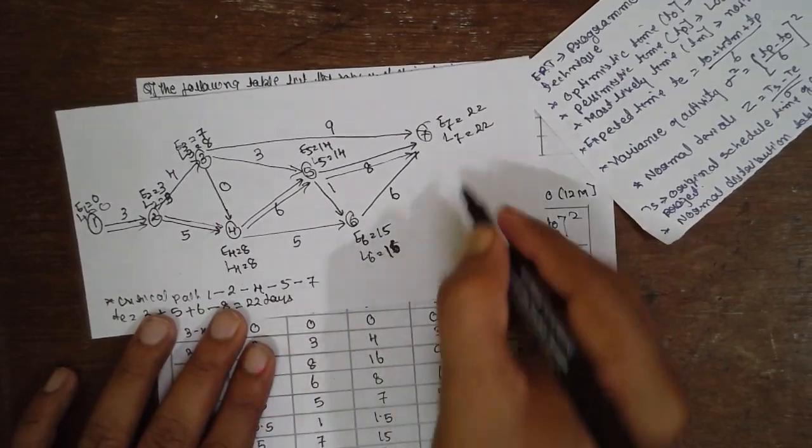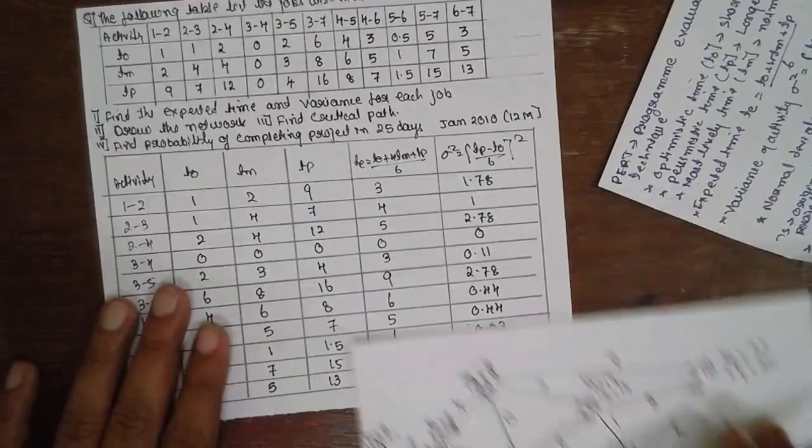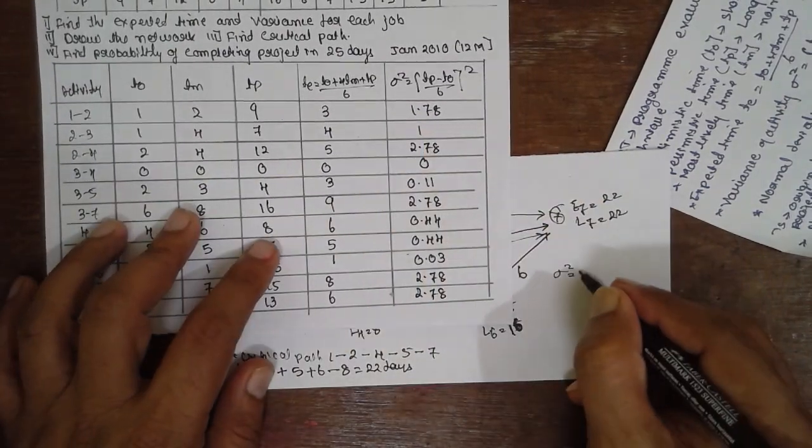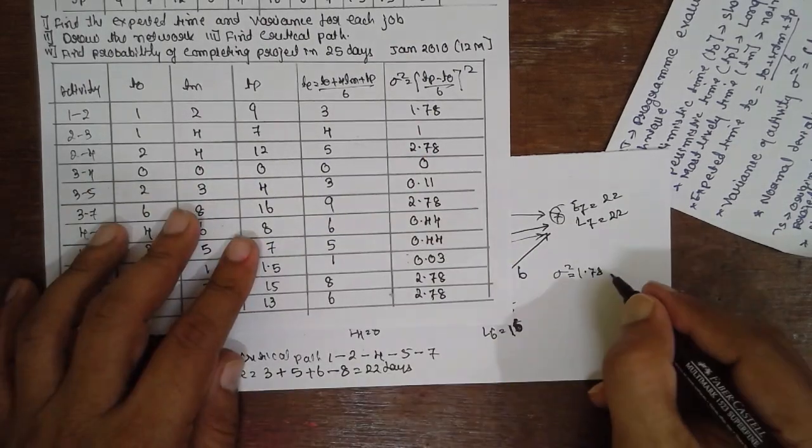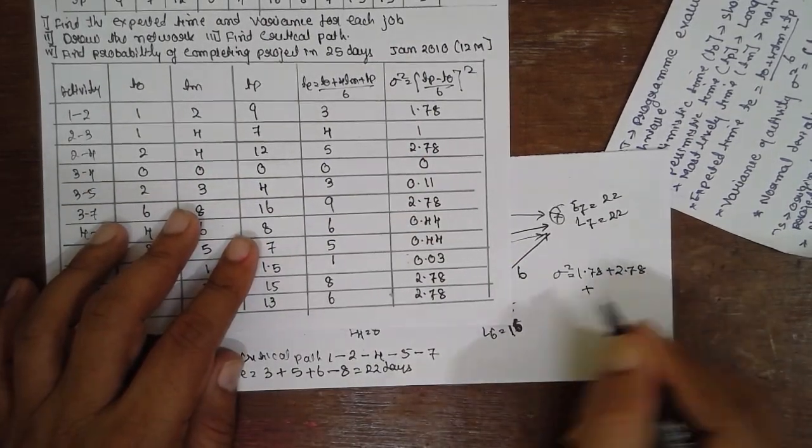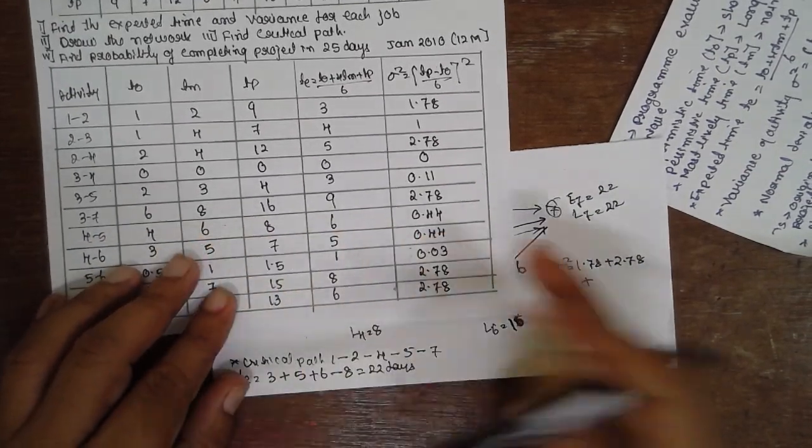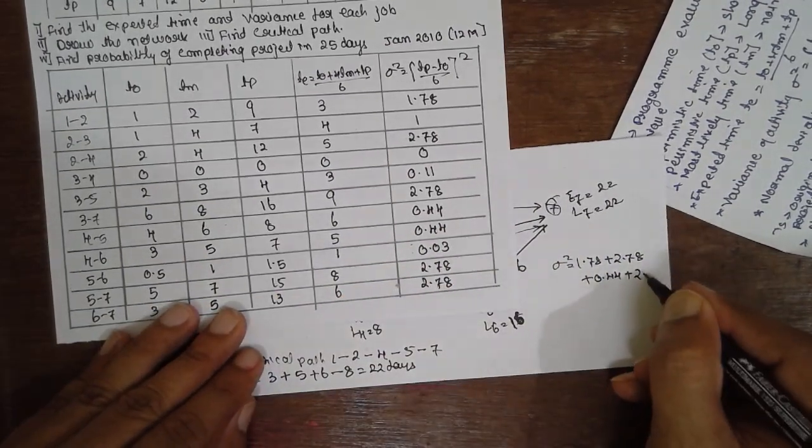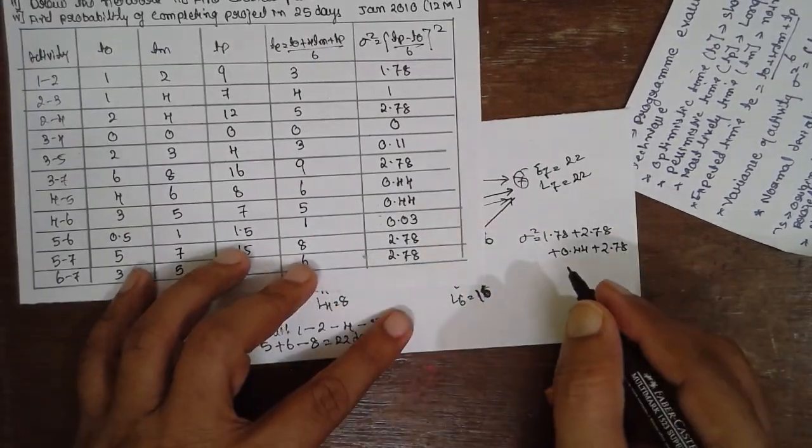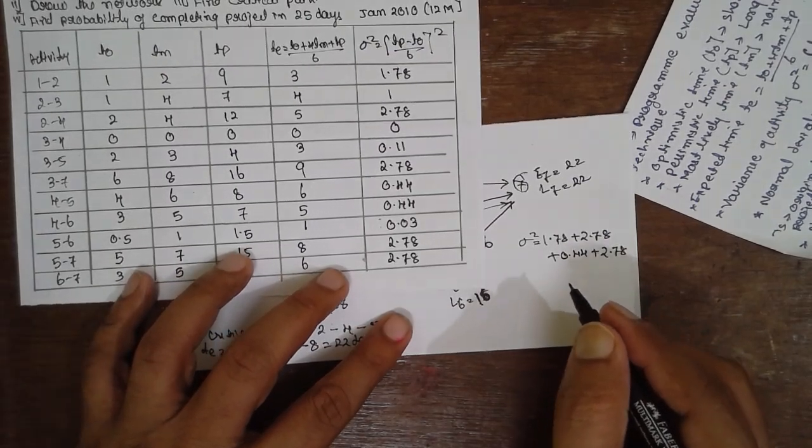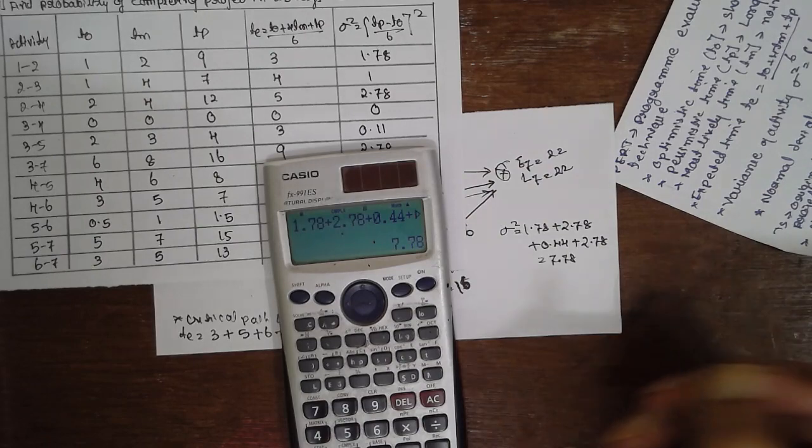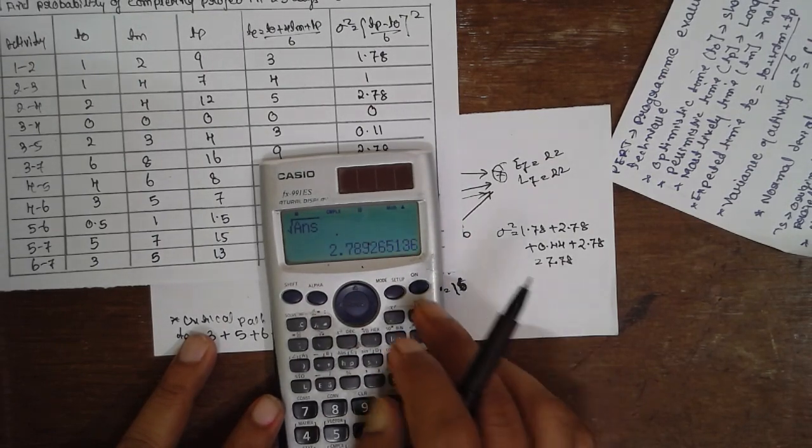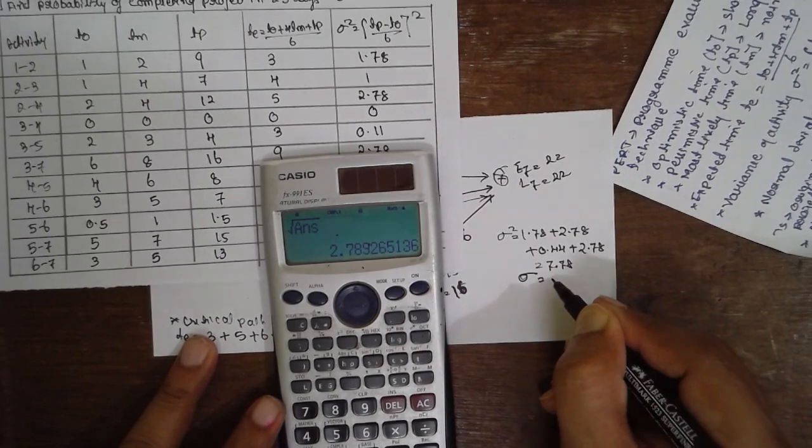Now find out the variance here. We will find out the variance sigma square. Variance should be obtained from the table here based upon the critical value. Now 1-2, 1-2 is 1.78. 2-4, 2-4, 2.78 plus 4-5. 4-5 is 0.44 plus 5-7. 5-7 is 2.78. Now we have to find out the variance. If we calculate, the value will be 2.78. This is the variance value we obtained. Go for square here. Sigma value will be 2.78 days.